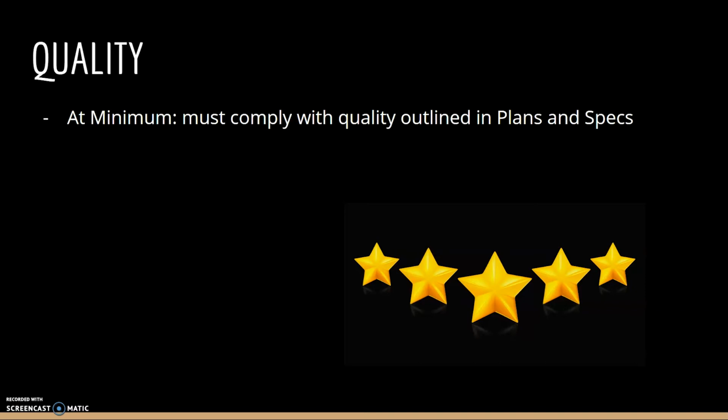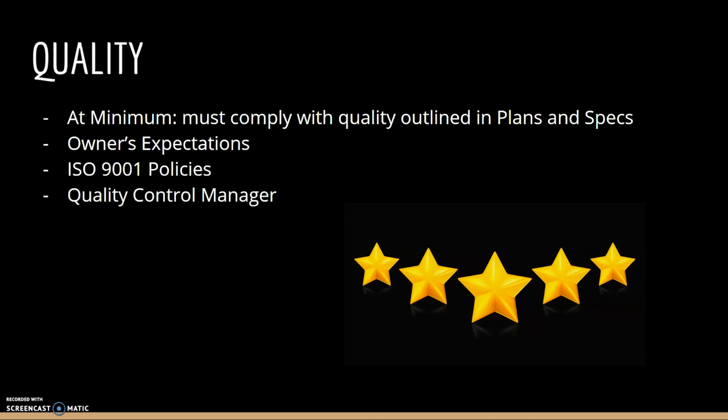Yes, so next on our agenda is the quality of the project. At a minimum, the project must comply with the quality in the contract documents. We're also taking into account the owner's expectations as well as the ISO 9001 policies. To make sure that we stay on track and meet all requirements, the quality control manager will conduct weekly meetings to recap all work done and to relay any information about issues with meeting requirements. Meetings will also include a segment on monitoring and reporting procedures and the process for delivering continuous improvement. The quality control manager will also put together daily reports and bring those to the meetings with the project managers.